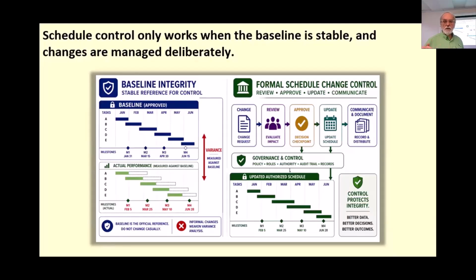That doesn't mean that the schedule can never change. Projects often do need schedule updates because of scope changes, new risk, resource constraints, external dependencies, or management decisions. What matters is how those changes happen. They should not occur informally or invisibly. They should move through a deliberate change process. PMI literature reinforces this by placing control schedule and perform integrated change control into the monitoring and controlling focus area. And this also helps us distinguish the baseline and the current working schedule.